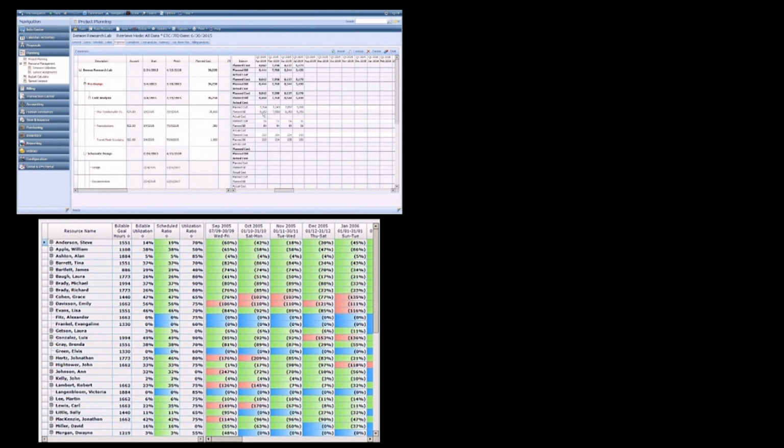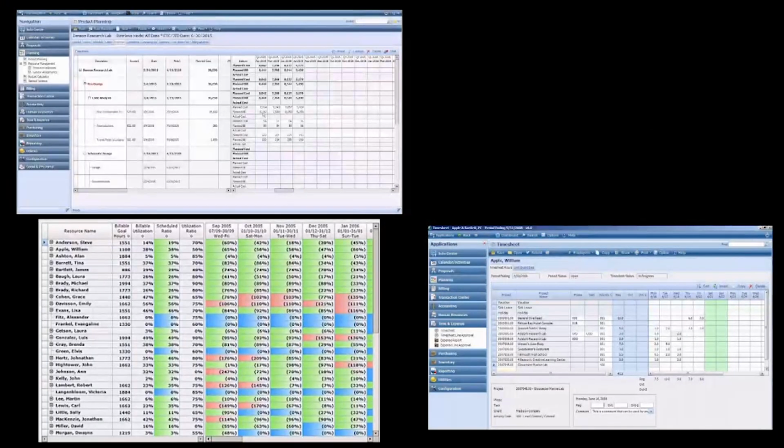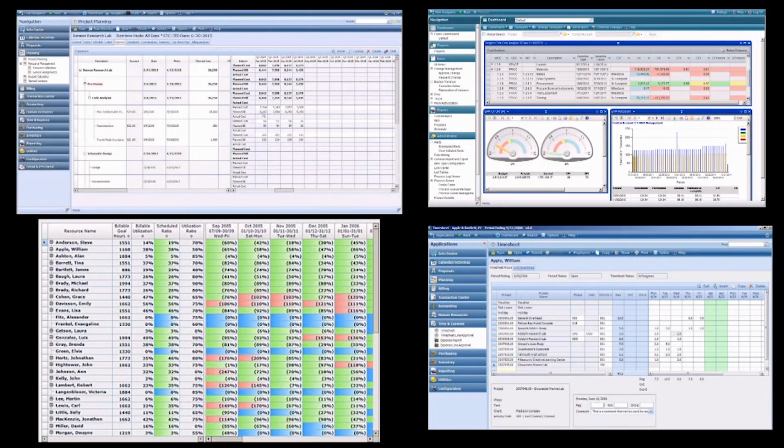And by using this knowledge, we're able to transfer workloads between people and free up resources so that the overheads on jobs which are loss-making can be managed without compromise. So when people are filling in their timesheets and we reprogram jobs with different staff components in order to save money, like we did on that scheme in Rosebank, we see that we can reduce our costs and our losses sevenfold. And so we were able to go from a situation which was really quite dire, keep our relationship and honor our commitments to our clients, and reduce our losses substantially because of the kind of software that we've been using to manage our business.